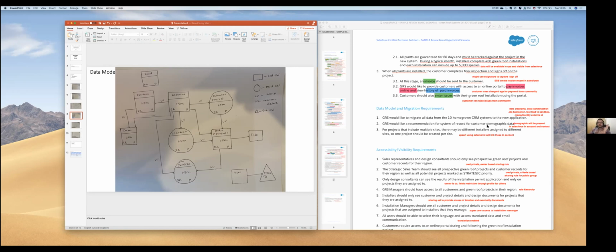And through bulk API, you can upload only 150 million per day. So it depends. And also how much automation you have done. Can you upload 150 million per day, or do you need to reduce your batch size? So all these things, if you are doing a dry run before, then it will help you gauge how much time it will take, right? So we would be having a data team, which would be working with us in parallel, and with the help of them, we would be optimizing all these things. That's how I would do it.